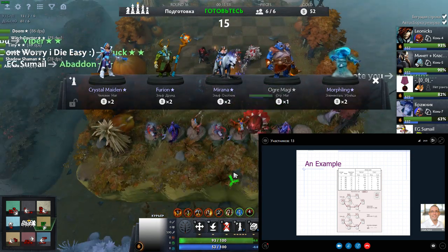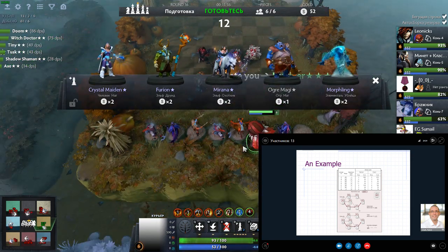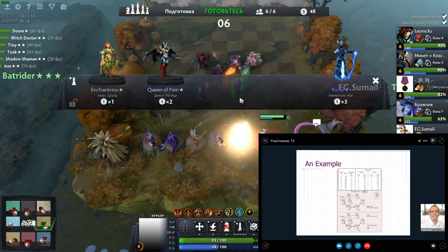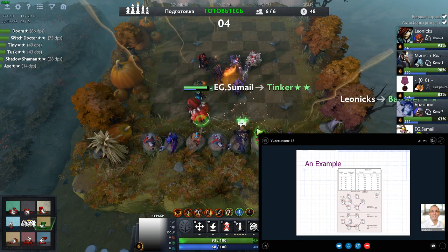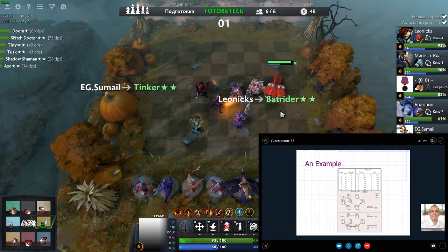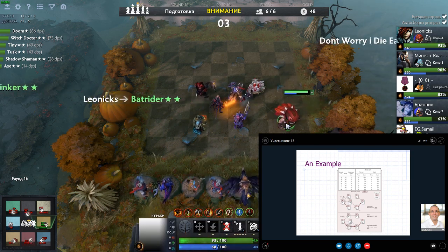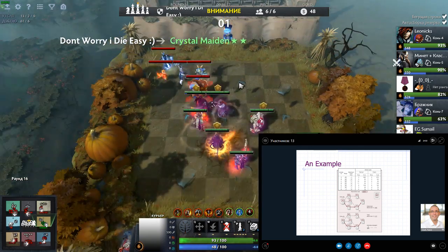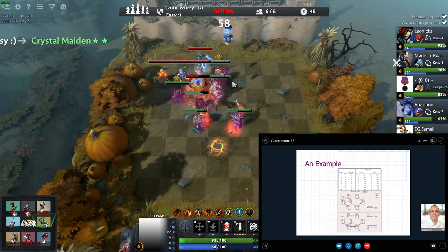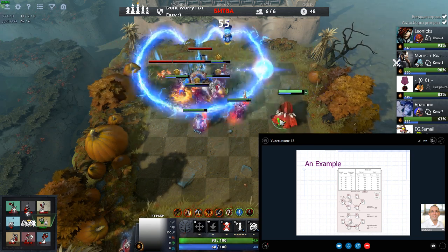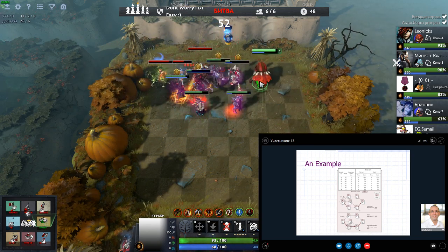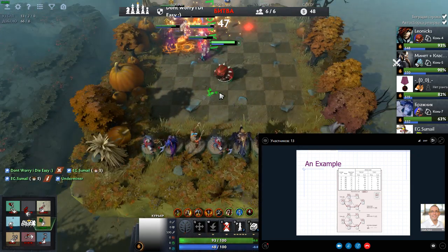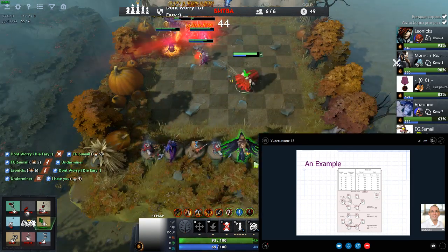The important thing to remember is, along with the minimal cost increase criterion that you want to use, you typically want to crash activities that are as close to the left-hand side, so the start of the network, as you possibly can, so they can have an impact at the earliest possible opportunity, and you don't use up lots of slack that you might have later on. So if you start crashing activities too late on and then you have another problem, you really don't have the possibility to recover sometimes from that.